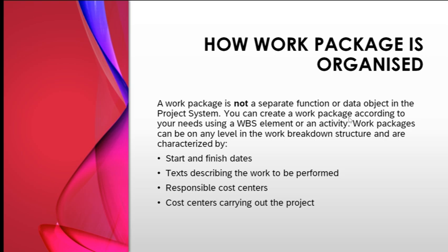A work package is not a separate function, or a separate data object in the project system. You can create a work package according to your needs using a WBS element or an activity. A work package can be on any level in the WBS, and can be characterized using start and finish dates and a text, that means a description of the work that is going to be performed.